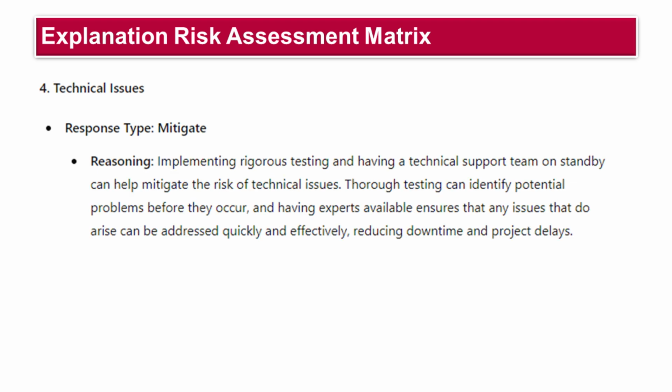For the risk of technical issues, the response type is mitigate. Implementing rigorous testing and having a technical support team on standby can help mitigate the risk of technical issues. Thorough testing can identify potential problems before they occur, and having experts available ensures that any issues that do arise can be addressed quickly and effectively, reducing downtime and project delays.